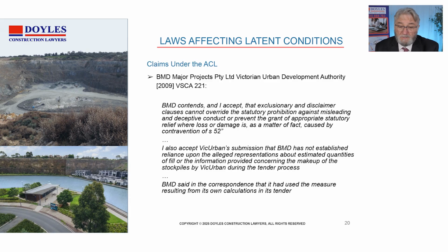So in this BMD Major Projects, the Victorian Urban Development matter, BMD contended, and the court accepted, that the exclusionary clauses cannot override the statutory prohibition on misleading or deceptive conduct. So I agreed that in a contractual situation, the clauses of the legislation overrode the contract. But the circumstance was that BMD did not show that they relied on the misleading information because it had said in its correspondence it used its own figures and information resulting from its own calculation in its tender.